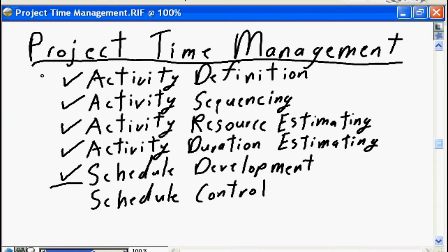Although it may appear overwhelming to have 5 separate components related to project schedule development, it actually isn't that bad. The PMBOK defines, and in reality you will find, that many times on smaller, simpler projects, activity definition, sequencing, resource estimating, duration estimating, and schedule development will happen concurrently. You will not be conscious of doing a separate activity for definition versus sequencing versus estimating versus development. And in fact, on many small projects, these 5 components will be done concurrently with developing the work breakdown structure as part of scope definition.